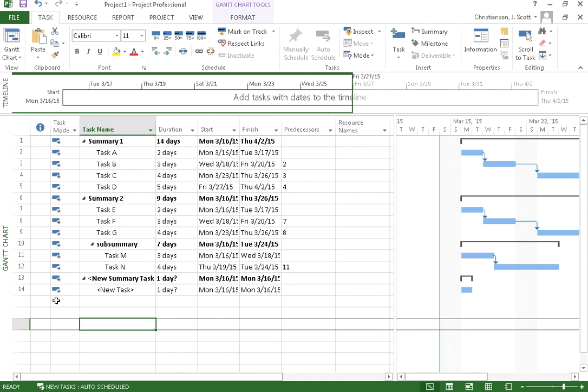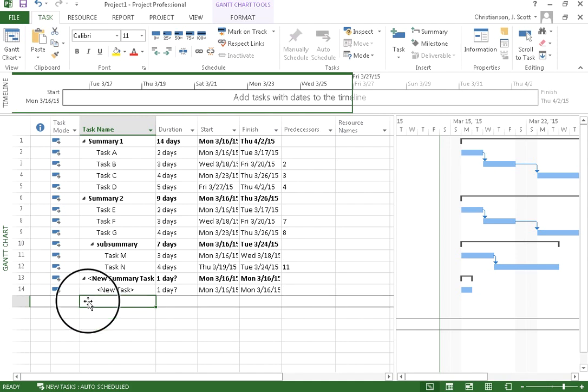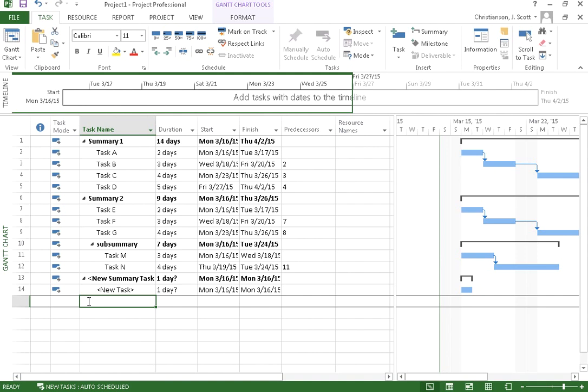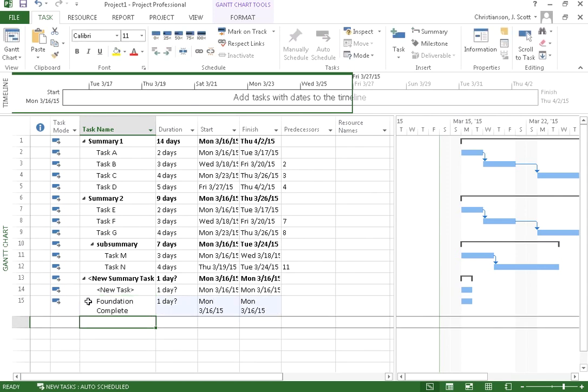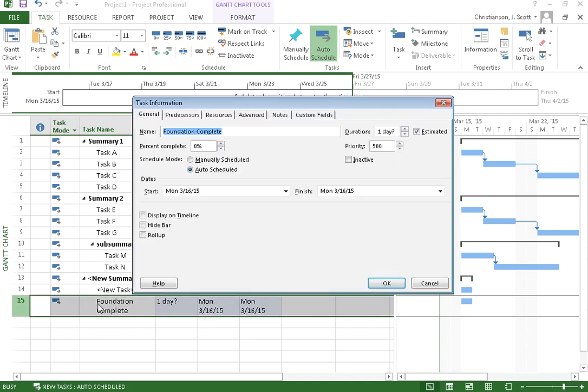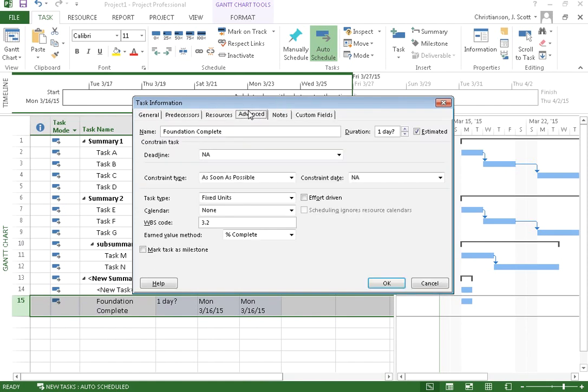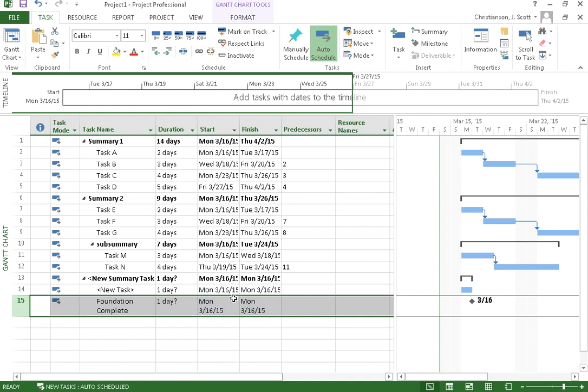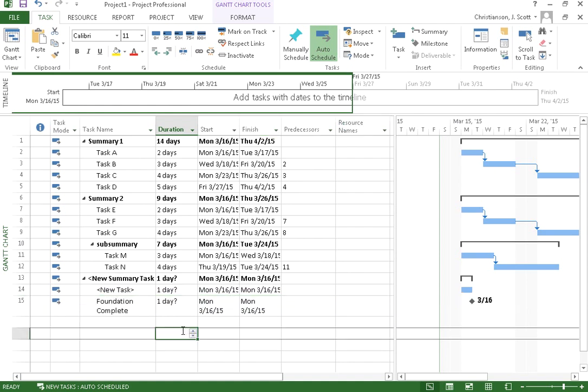One last thing I want to show you here is a special kind of task called a milestone. So let's say that we have a particular milestone. Our foundation is complete. And we want to mark this particular event. We can do that in a number of ways. One is if you double click on there and go to the task properties, you will see that we can set this to be a milestone under advanced. So if we go to advanced properties and say mark task as milestone, we can do that.